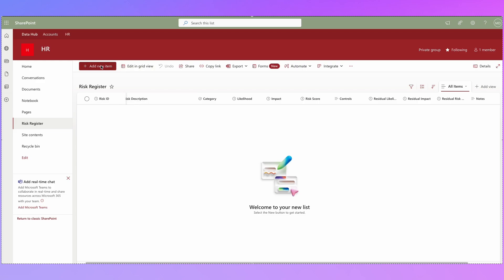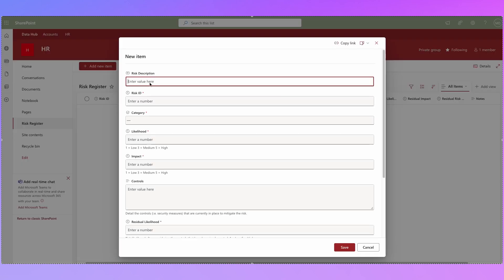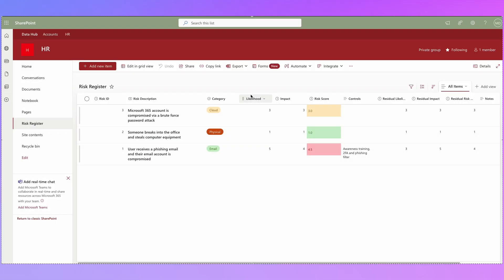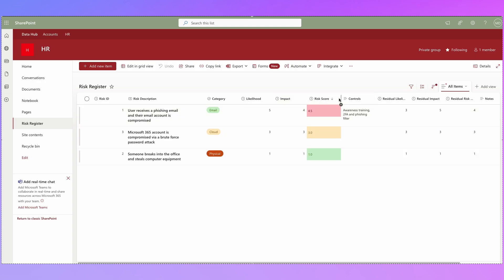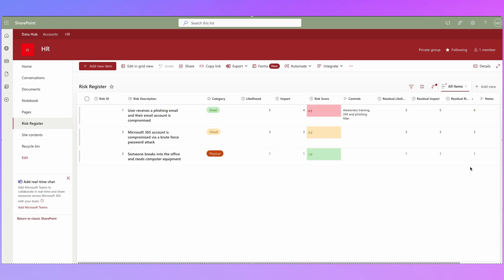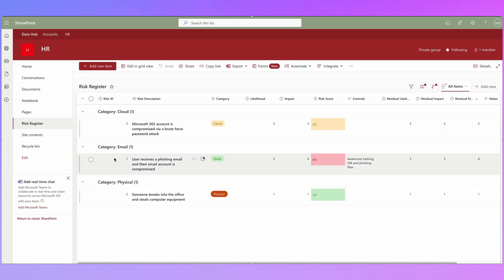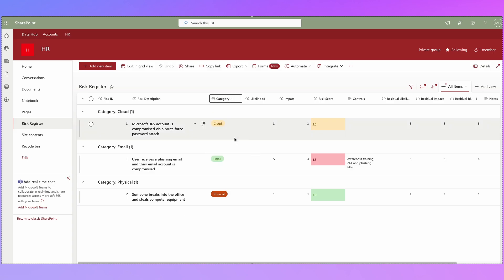Let's create a new item to test the conditional formatting — using the phishing example again. Now that you've created this list you can do all sorts of filtering and grouping. For example, sort by Risk Score largest to smallest, or sort by Residual Risk Score. You can also group by Category to see all Email risks together, all Physical risks together, and all Cloud risks together. To turn grouping off, click back on Category and uncheck Group by Category.